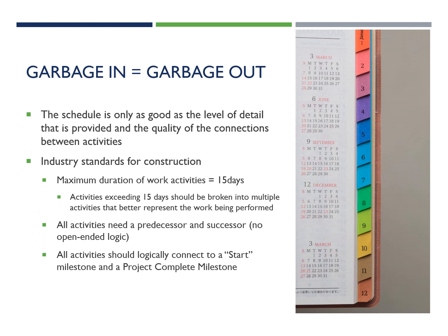All activities need a predecessor and successor. No open-ended logic. So all activities have to have something that connects to when they're supposed to start, and they have to connect to something that follows up. So it could be project start connects to landscaping, and landscaping connects to project completion. There would be continuity there. There's no open ends on either side of that landscaping activity.